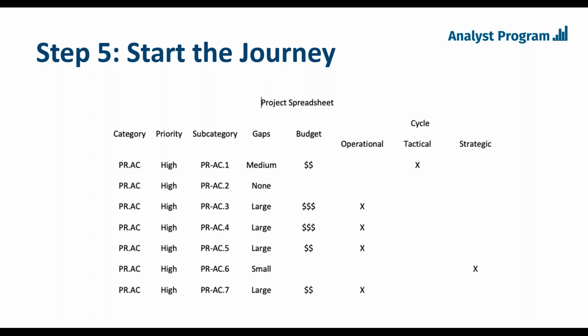And so here we see a case where 3 of the largest gaps are operational. They're fairly expensive in terms of budget, but because they fall into that operational area, they should probably become the first 6 to 12 months of effort, as opposed to efforts that might be medium in a tactical sense or strategic, that are small at this point and may increase, the gap can increase as you move more, let's say, into an automated world. So this is the kind of tool where you can lay out